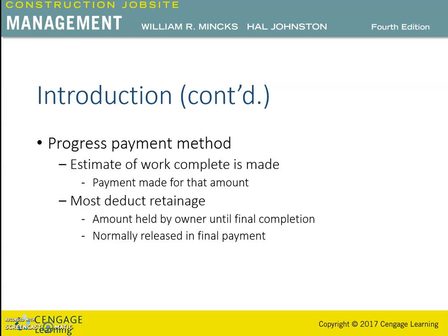It can be held for a number of reasons depending on the owner and the owner's contracting rules. In some cases, retainage is held by the owner to complete the project if necessary. Some owners, particularly public owners, retain an amount as a reserve fund to cover material man and subcontractor liens on the project. So varying amount of retainages are held by owners, usually 5 to 10%.